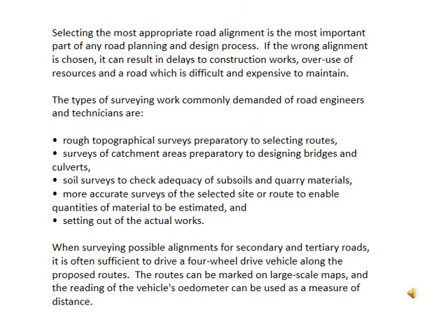The next one is that we had to make this road alignment. We had to select the most appropriate road alignments. Selecting the most appropriate road alignment is the most important part of the road planning and design process. If the wrong alignment is chosen, it can result in delays to the construction work, overuse of resources, and the roadway is difficult and expensive to maintain.